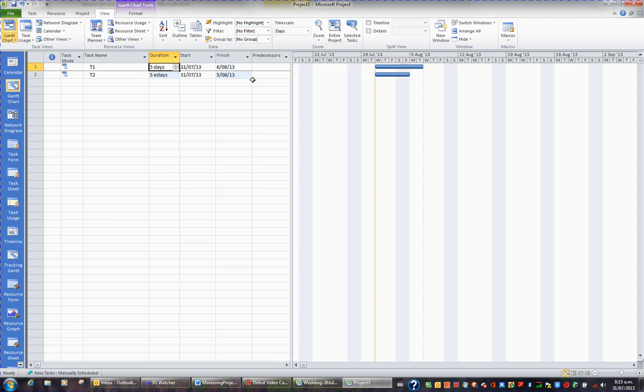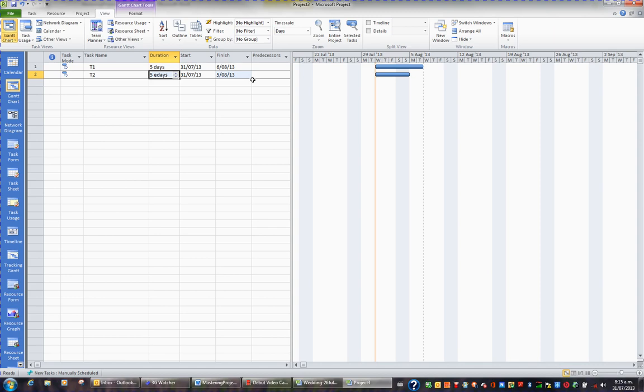If you need to enter a duration that's an elapsed duration, simply put an E. You can have ED for elapsed days, EH for elapsed hours, EW for elapsed weeks. An elapsed week, for example, would be 24 hours a day, seven days a week.